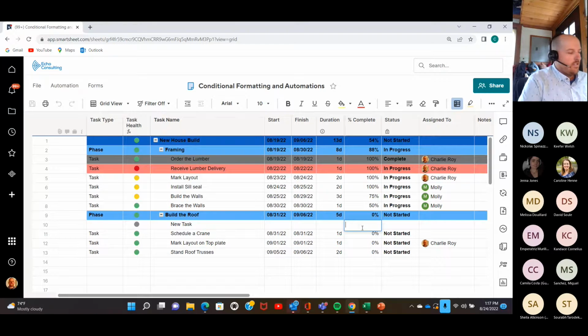Sorry. Basically, if you enter a value in these percent complete columns versus having the actual number that you want to appear, sometimes when you enter, say, like 100, that would show up as 10,000%, if you understand what I mean. So versus putting like 0.3 or 0.4, those would then transfer to 30 or 40%.